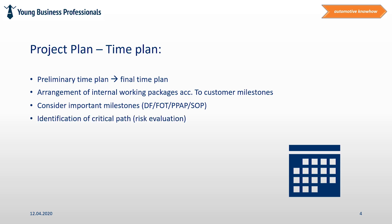It is useful for the project manager to analyze the time plan with regard to the critical path. The critical path is a chain of working packages or activities during the project where, if one single step in this chain is delayed, the rest of the activities inside this chain will delay accordingly. So we are talking about the most sensitive activities of the project with regard to delays — a kind of risk analysis that helps the project manager understand priorities.